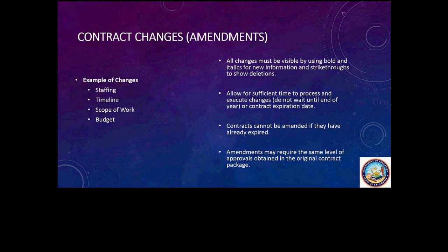So we've received one question so far. What documentation is required of any subcontractor to verify charges that incurred? So we're not going to necessarily collect that information during the reporting as part of the progress reports and the report of grantees and the invoice tool during this process. However, we recommend that you maintain that documentation for auditing and for monitoring purposes. That can be requested at any time per the contract, and it's important to maintain that documentation.